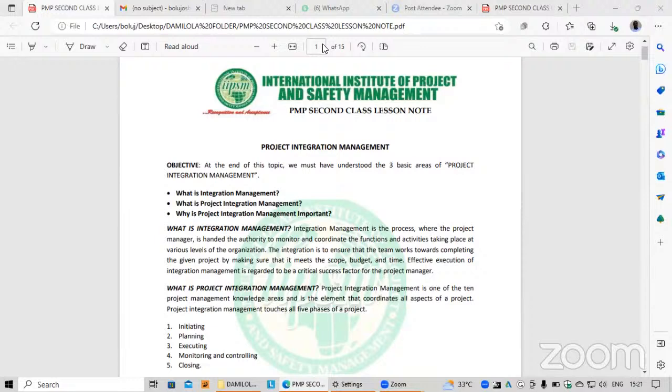Someone asked a question last week: if a project charter has been signed and established, can it be altered? And I answered that question by saying it is possible. A project charter is signed and established. However, the project manager, as the project proceeds, may become aware of certain things or certain enterprise environmental factors that may warrant certain changes in the scope of that project. Now, these factors may not be the fault of the project manager. However, the project manager does not have any right to effect those changes without effective communication with the sponsor of the project.